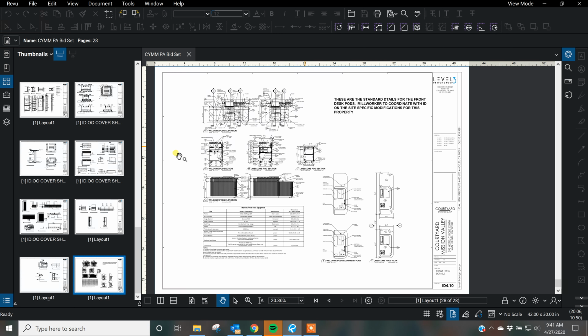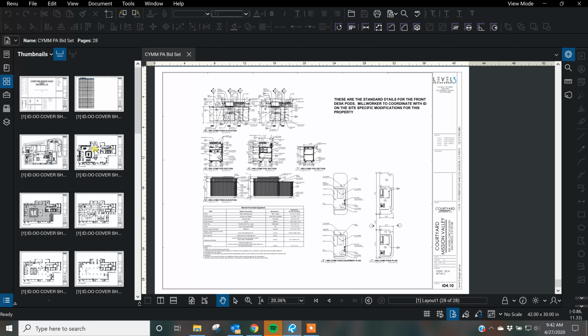So that's a construction document set. We throw as much information in as possible. The contractor uses it to bid all of his work for the interiors. He sends it out to all of his subs, so all of the wall covering installers, tile installers, millwork subs, plumbers, electricians. And the more information we can put into this set, the less problems we have down the line. That's what happens in construction document phase.